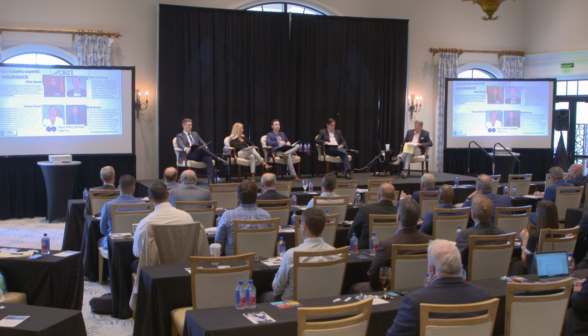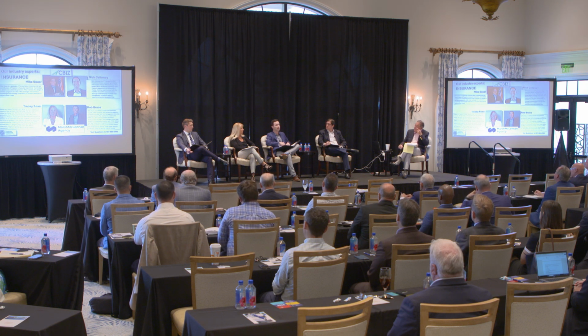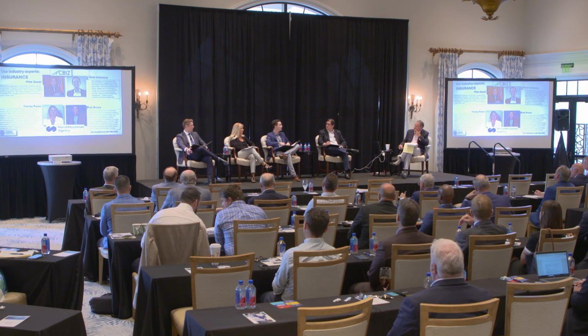So we have a club that built a fitness center just a few years ago, and the code in their county did not require sprinklers, so they didn't put them in. But most insurance carriers want to have sprinklers, especially in a fitness building that has a ton of electrical equipment, in order to offer insurance. And so in that case, we have to find inferior coverage for that club because they don't have that protection that they could have added during the project.